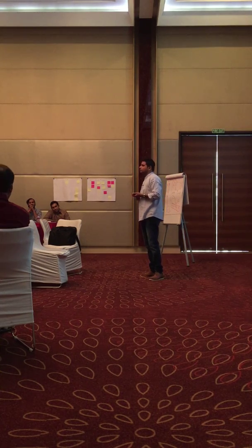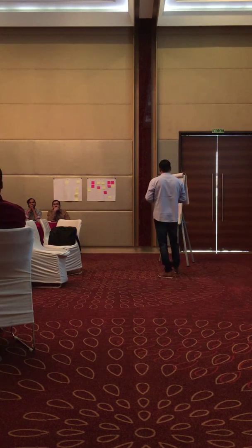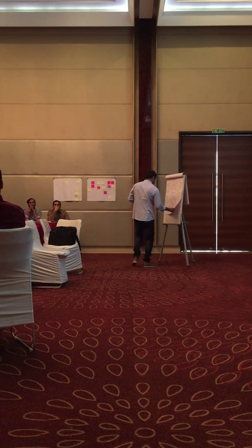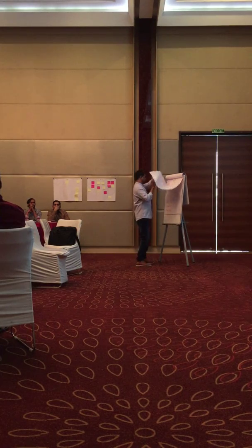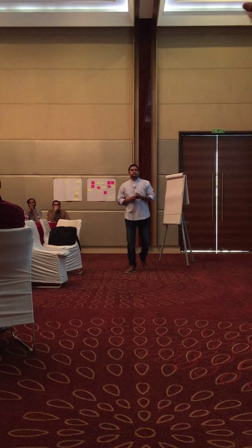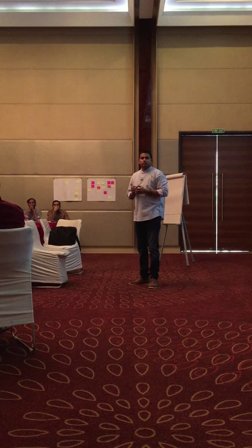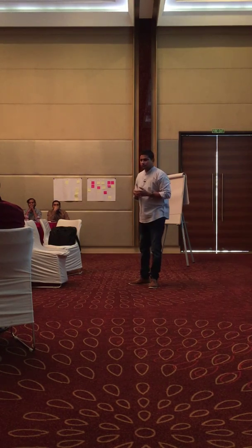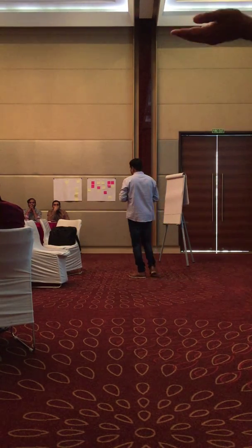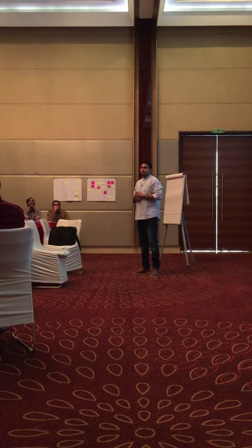Just want to add something here, Vijay. When we talk about when to do it, because Vijay mentioned the PPF concept, right? Past, present, and future. Like in your backlog, your sprint also will have time established where you are discussing these items. So in your sprint, while you're developing new things, you're also thinking about which stories are next, elaborating them, detailing them out, and so on. So that PPF also applies to the sprint duration. You will take out time every sprint to think about what is coming next, what design details we put in, what UI we put in, and all those kinds of things. That's what is backlog refinement.